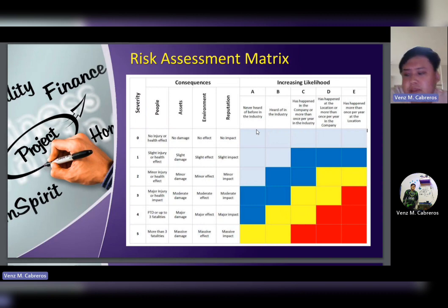Risk matrix is sometimes called a probability and impact matrix. This is an effective tool that can help the risk evaluation by focusing on the probability of a potential risk. A risk assessment matrix can help you calculate the project risk quickly. It does this by identifying the things that could go wrong and weighing the potential damage. This makes it easy to prioritize problems.